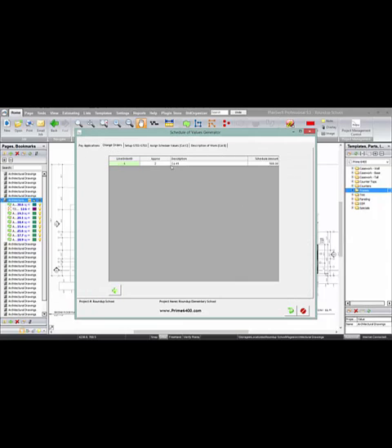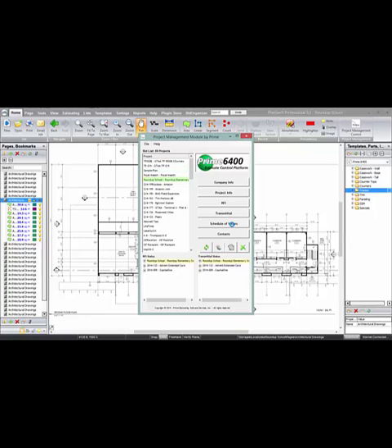We also have an area for change orders. Once you receive your change orders, you can apply them to each of the pay applications. Change order 1 will go on to pay app number 2, and it was $500. So that will appear on your next pay application to be able to bill against. So there's our schedule of values generator.